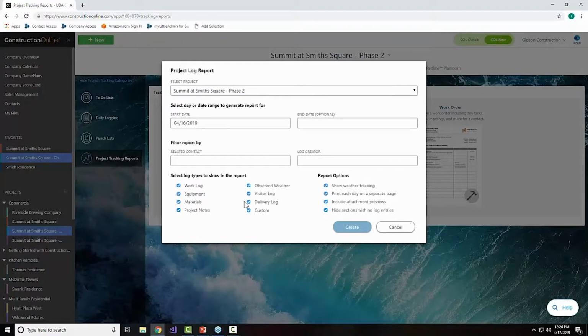Now again, Holly, you touched on one of the unfortunate occurrences that happens from time to time for construction companies. Sometimes there are disputes. Sometimes there's a question, especially later on once the job is complete. Something might seem like it was faulty work. The one that always comes to mind for me, there was a hotel that was built down in Florida, and one of our clients actually took over the repair for the job because the construction company that built it didn't have strong documentation or pictures for the support for the balcony that collapsed on this hotel.